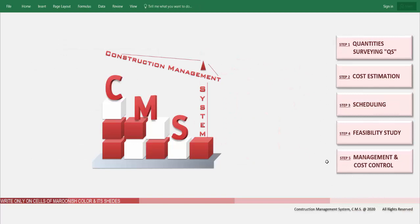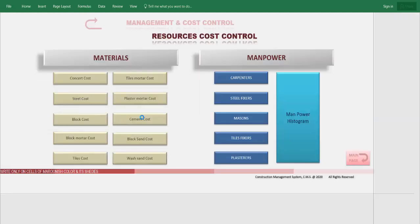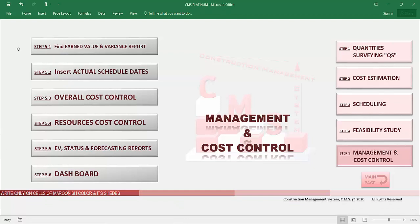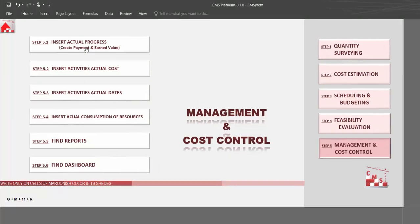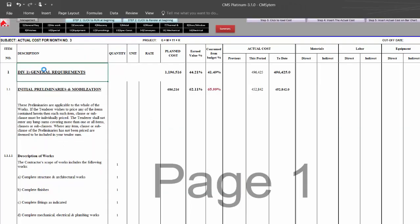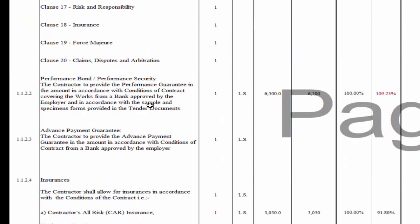CMS will help you manage your project during execution. After completing everything in the tender and pre-contracting stage, CMS makes full management for cost and resources. The steps to reach final reports and recommendations include: CMS finding the earned value according to actual progress on site, helping make monthly payments according to actual progress, and creating a cost code for each activity to record and assign all costs for each activity during project execution.